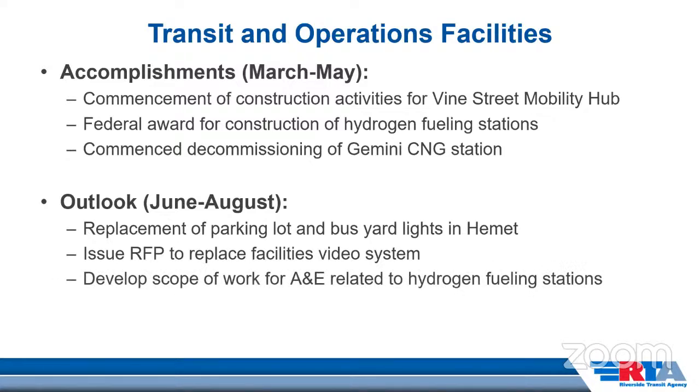And lastly, we do plan to develop the scope of work for the architectural and engineering, the A&E, related to those hydrogen fueling stations. The A&E is expected to take place in calendar 2023, so ultimately construction can begin in calendar 2024. And that's all I have for my capital updates. Thank you very much.